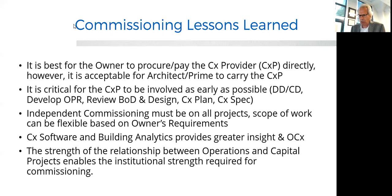The last topic is project closeout. Commissioning through a large building can actually close that building in 2 to 3 months. We all have stories of buildings that never close. We all have stories of buildings that we just put up with. We close off all of our buildings, all of our documents, as I said before, and we do it with integrity, and we put it in front of our faculties, and we put it in front of our other users, because commissioning is required to provide the documentation to let the project manager walk away and be done with it, as well as to let the operations people take it over and understand where they are.